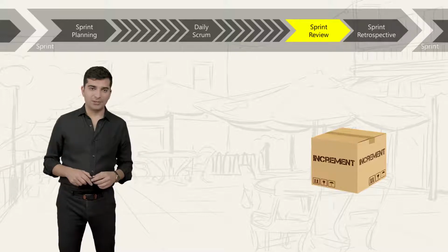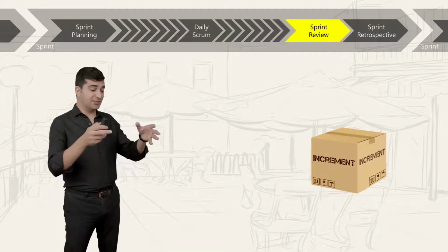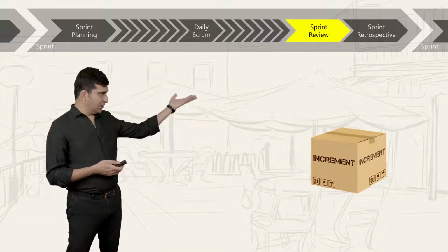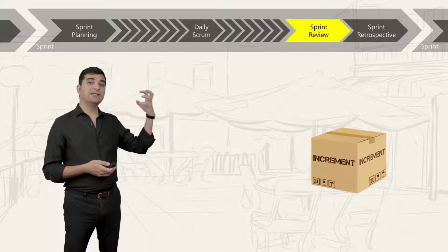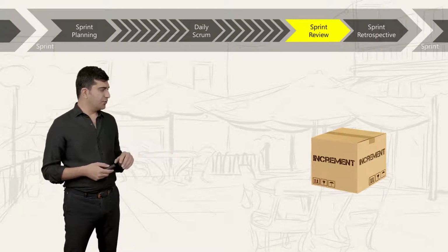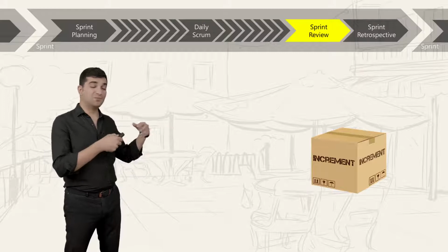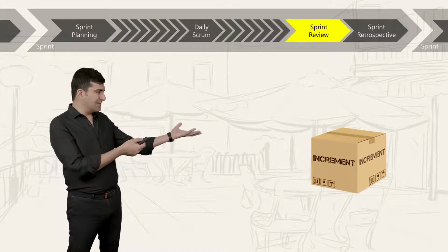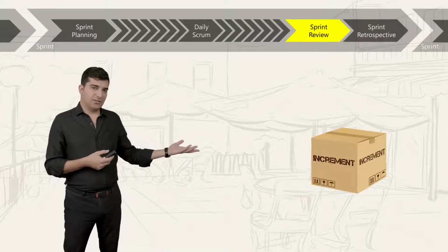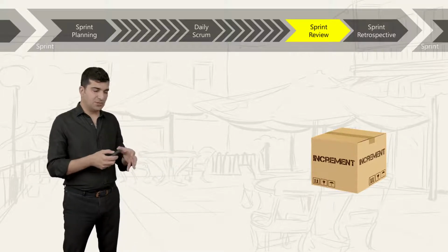Sprints are time boxed. So at the end, we will have an increment, and that is the latest version of our software, which includes all the features that we have developed during the sprint and previous sprints. And everything that we put into that increment must be potentially releasable. Not everything. Everything there must be done, and that creates a potentially releasable product. We may not release it to production, but it has to stay releasable.